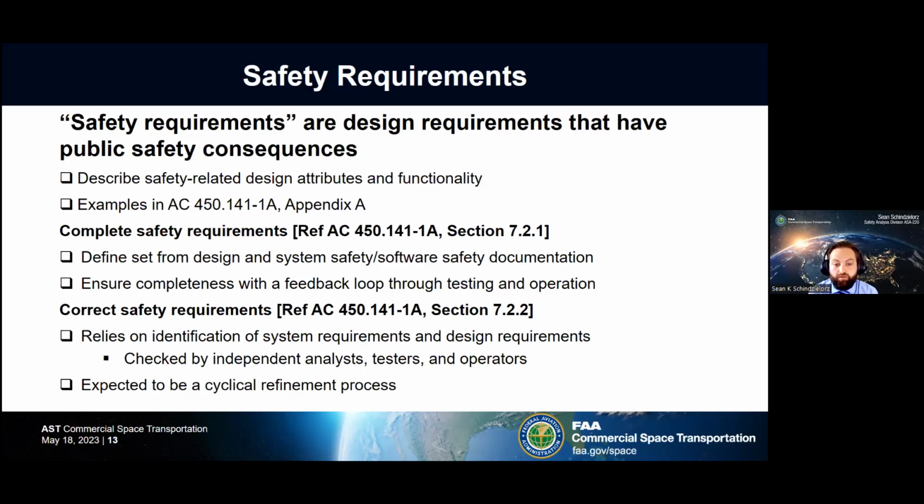When looking at a requirements management process, we really look to see that the applicant identifies what their system needs to do, evaluates why their system needs to do it, implements, i.e. defines how their system will do it, and describes the means by which they will verify that the system can do it or actually doesn't.